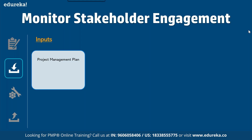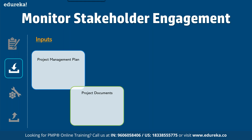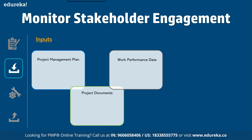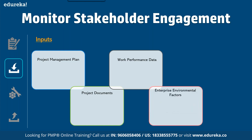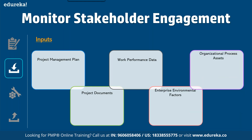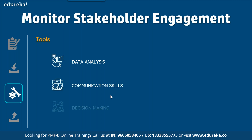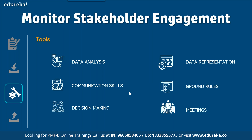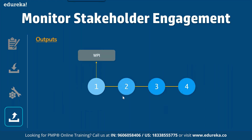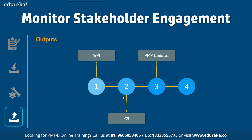The inputs for monitor stakeholder engagement: First is the project management plan — resource management plan, communication management plan, and stakeholder management plan. Second is project documents — issue log, risk register, and stakeholder register. Third is work performance data, containing data on project status. Fourth is enterprise environmental factors — geographic distribution, communication channels, and stakeholder thresholds. Fifth is organizational process assets — standard guidelines, organizational communication requirements. The tools include data analysis, communication tools, decision making, data representation, ground rules, and meetings. The four outputs are: work performance information, change request, project management plan updates, and project document updates.